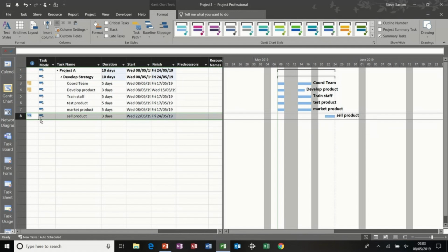Now when I've done that, it's the same as me changing this day manually, so we get the same thing coming up in the information column, a little moderate constraint. Now, if you sit your mouse on the front of that task, you can accidentally start doing percentage complete on it. So you have to be quite careful where you sit your mouse. Let's do undo on that.